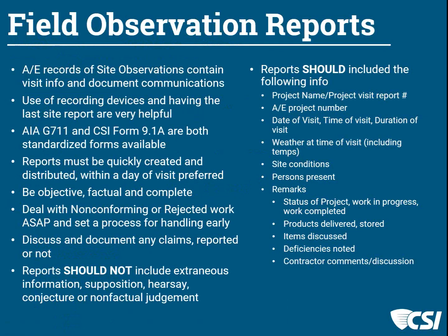But these reports, you should remember, should be created quickly. They should be distributed quickly. If you can do that within a day of the visit, you will be a hero. I know that is a really quick turnaround time, but if you are able to do that and confirm that you are being factual and complete as well as objective within that report, the construction community and your client will love you, because there is the information and you're able to move on from that observation to the next.